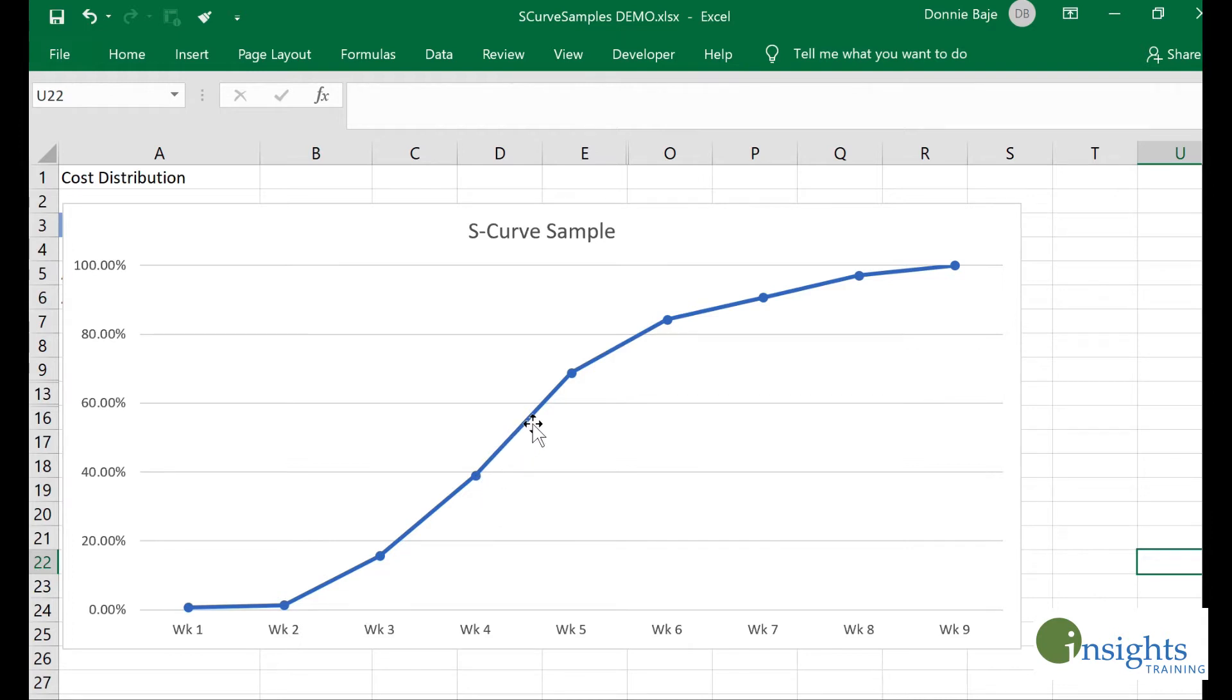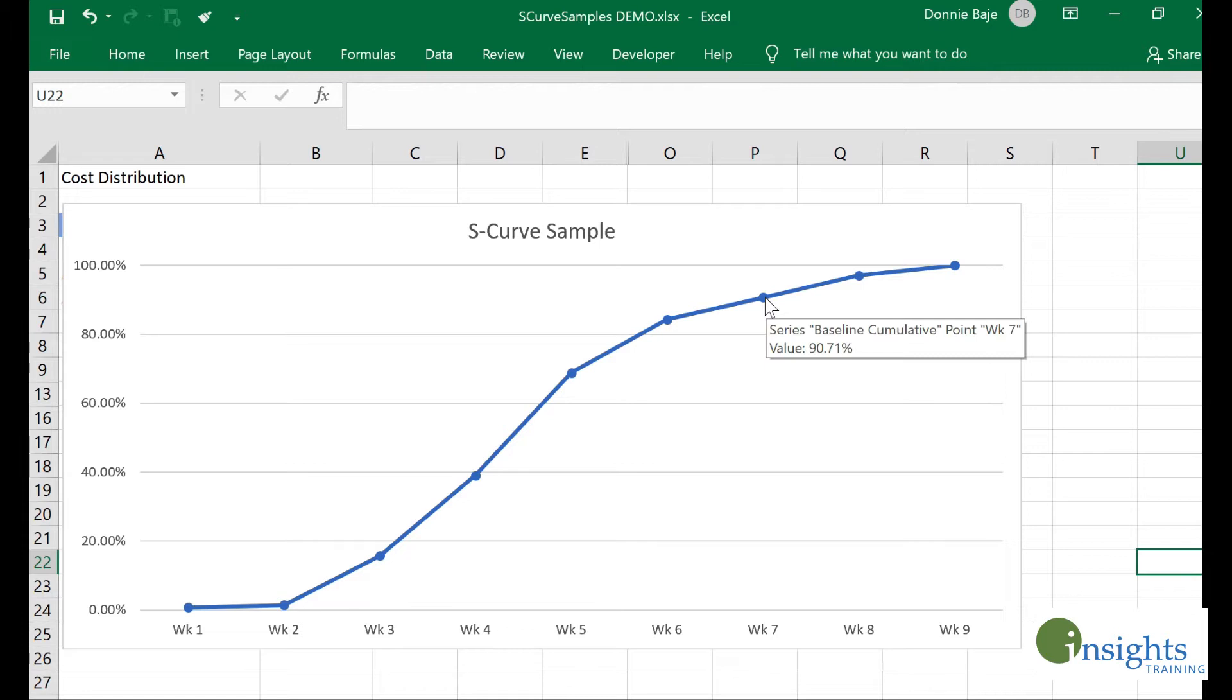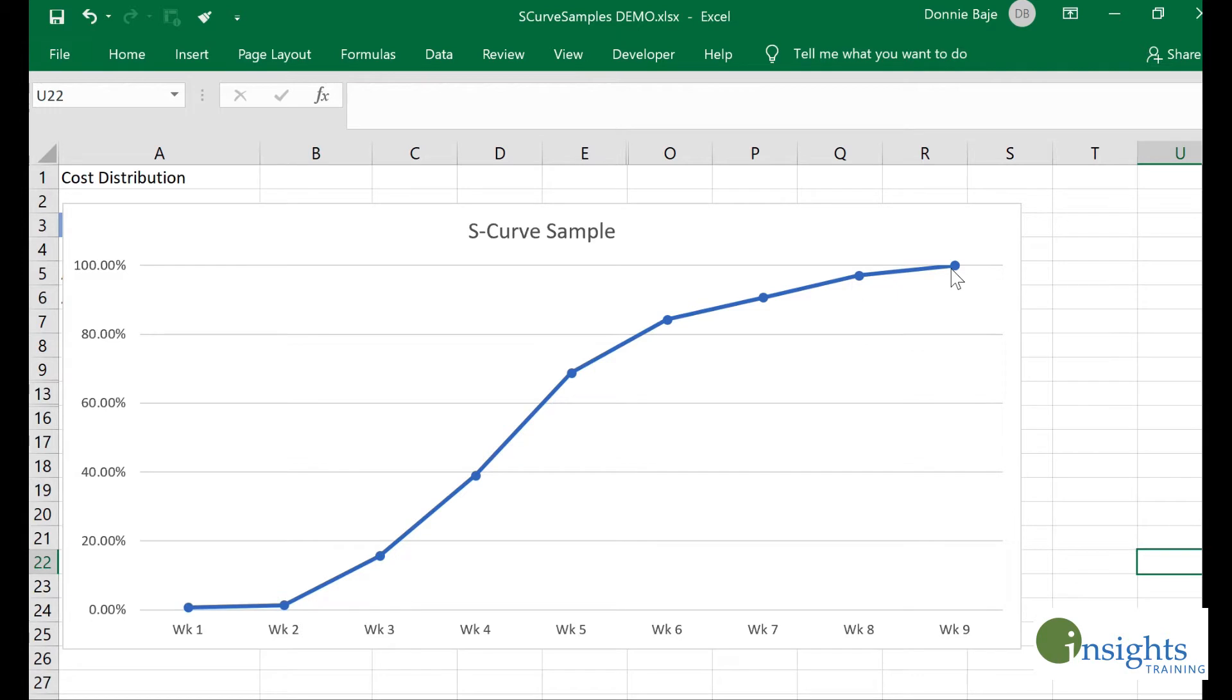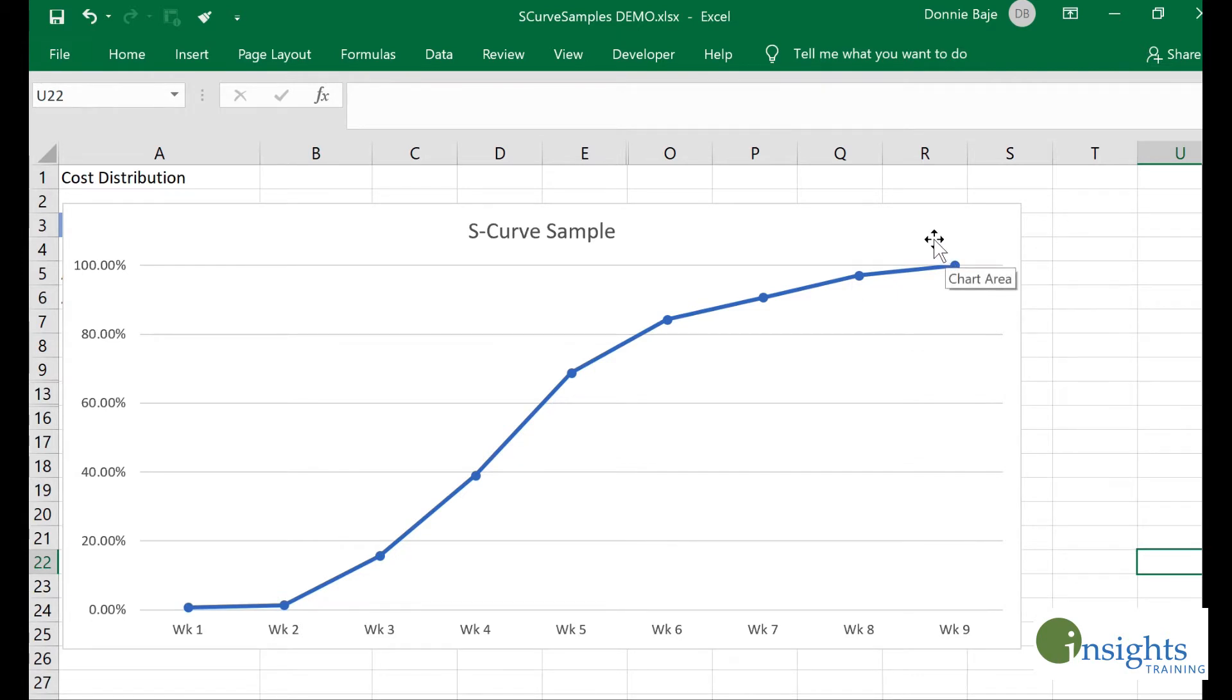The project will eventually start using a big amount of its cost or budget around week four. By week seven we've already utilized around 90 percent of our budget. By week eight and week nine, 100 percent of your budget should have been utilized.